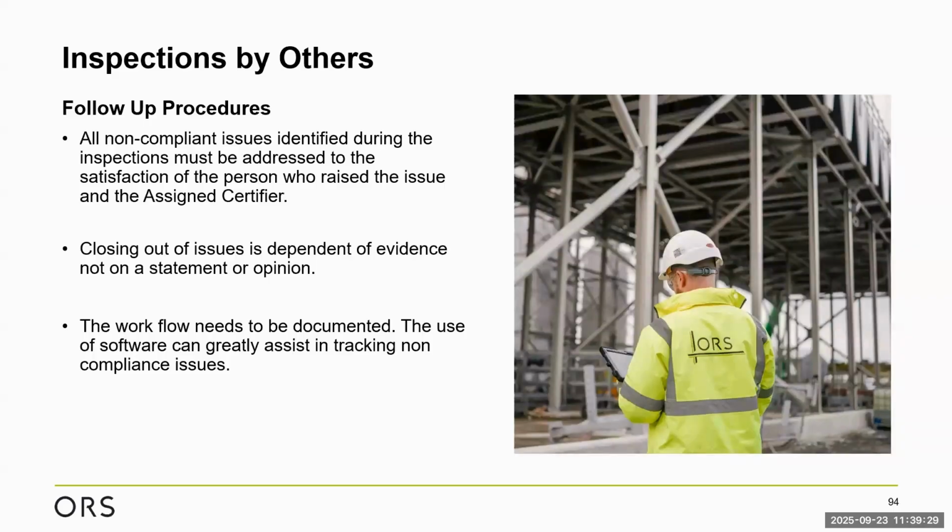Closing of an issue is dependent on evidence. Again, one of the previous speakers spoke about this. It's not a statement or an opinion. So if something has been spotted on site, I need to see evidence of how that's been addressed. It could be photographic evidence, it could be a report and a narrative to support that. The workflow needs to be documented. And again, previous speaker mentioned, the use of software can greatly assist in the tracking of compliance, and there's various softwares out there.